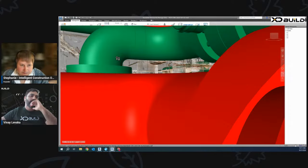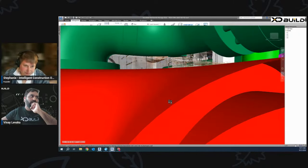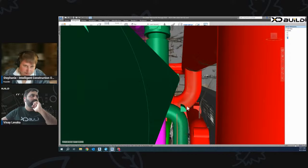Welding these joints on site would need safety harnesses, and we would need to get stuck into narrow, constricted spaces to make these welds. Most of the time it's very hard to make these stick welds on site. So we prefabricate everything, and the only pieces that we would like to keep for site are the equipment connections.